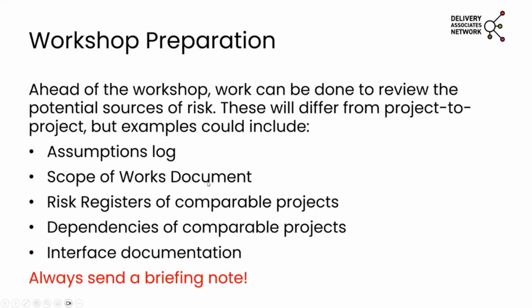So, how should we prepare for a risk workshop? Ahead of the workshop, in order to maximize stakeholders' use of time, it's important to review the potential sources of risk. This will be different from project to project, but examples would be sending to the attendees, encouraging everyone to review the assumptions log, scope of work document, and any existing risk registers of comparable projects or previous phases of the same project. Some risks are recurring themes, dependencies of comparable projects, and interface documentation.